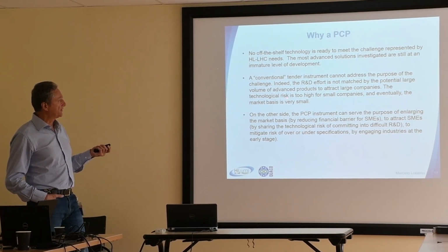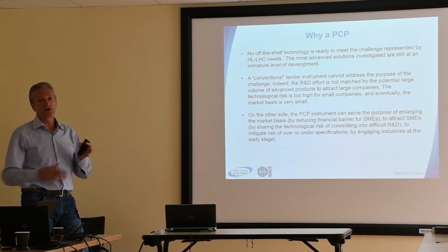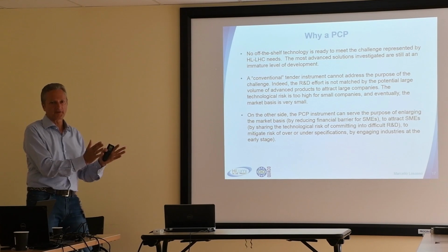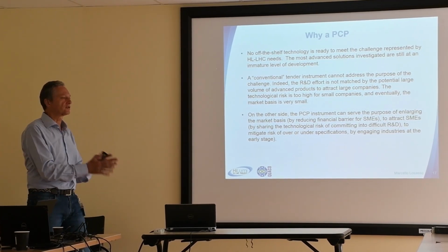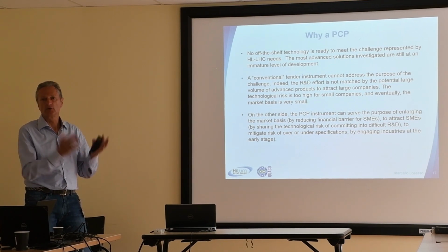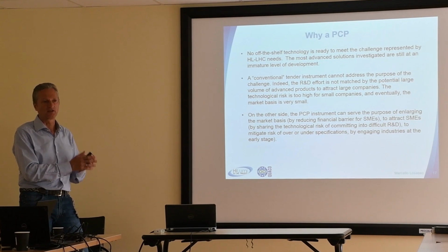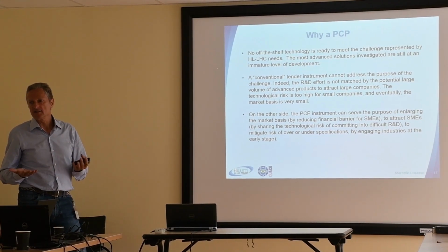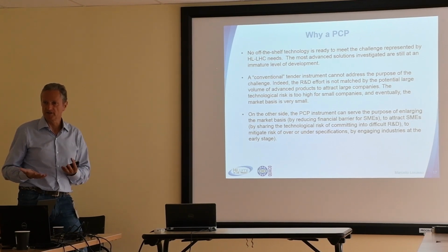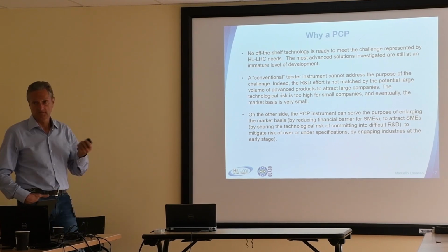There is a lot of risk for the company. So, if you are able to give only a fraction of the risk to the company, because you are just evaluating, for example, the first phase, the conceptual design, the company will be much more willing to participate in a difficult development.